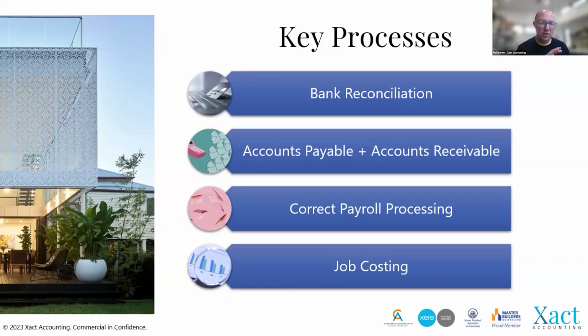And then there's job costing in Xero, where you can allocate things to carpentry, et cetera, those kind of higher level codes. Then there's job costing in Build Exact itself, or in your job management and estimating software. That's mission critical too. That is where you're not just lining it up to, say, carpentry, but you're actually lining it up to the estimate. So you're matching what the actual cost is against the estimate, and you're looking at whether there's been a variance, so that you can really see how your margin is going, in real time. There's job costing in your platform, and then there's job costing on the Xero side of things as well.